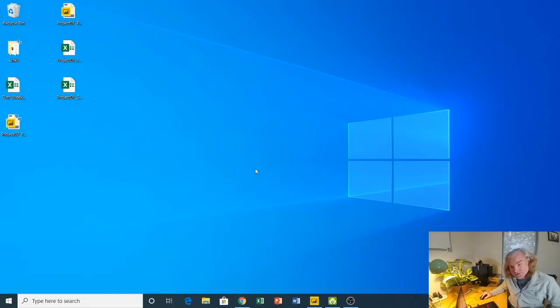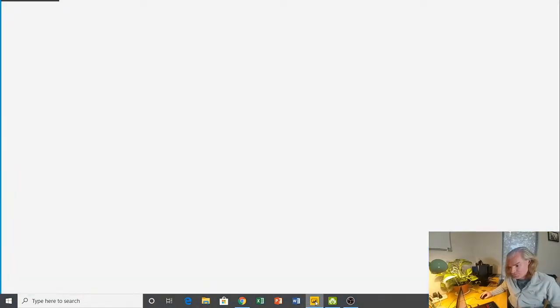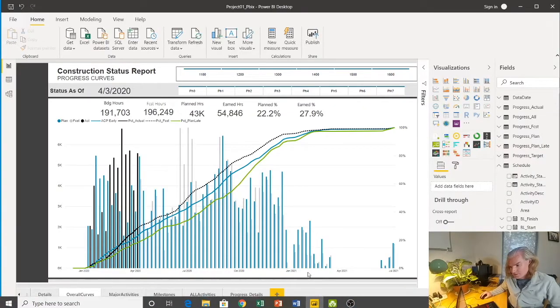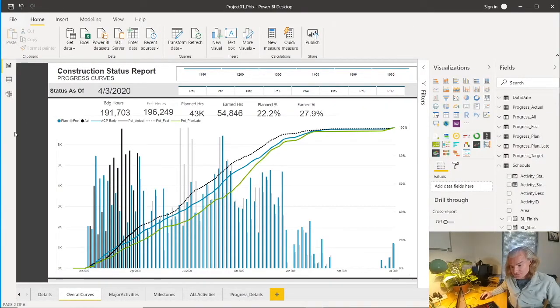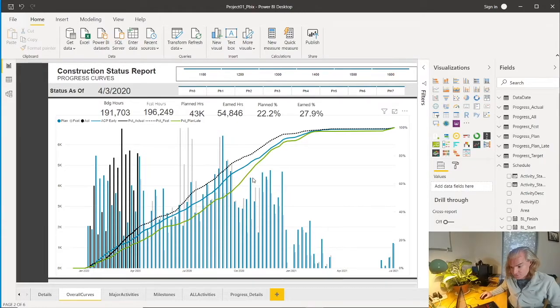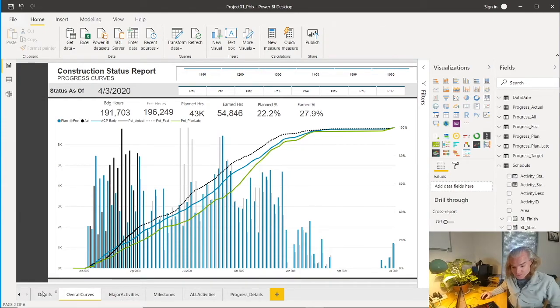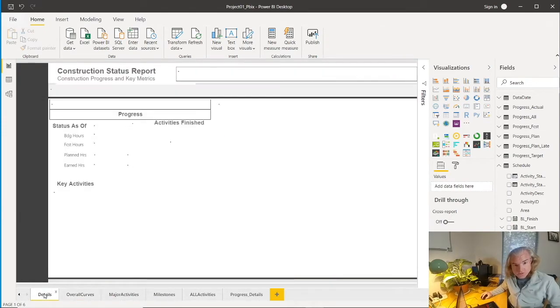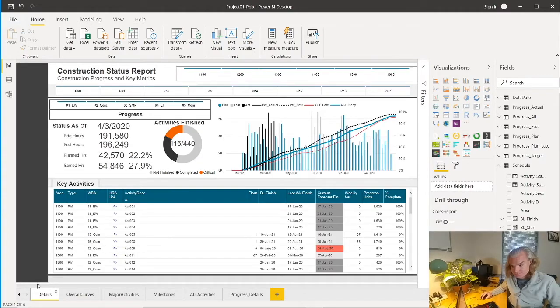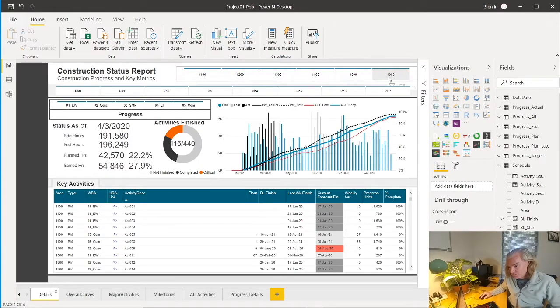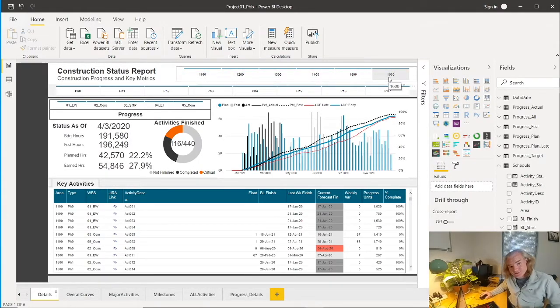Let's dive into our dashboard. We've seen this in prior videos - it's our progress curve. We also have other tabs: major milestones, activities, detailed progress. We have a detail page where you can go into details of our WBSs. In the Agile world, these are called epics.